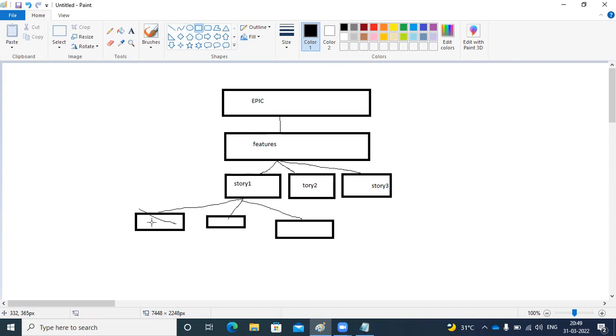So these tasks will be taken by developers or testers or whoever is responsible. If it is a design task, the design team will take that. If it is a development task, a coding thing, the developers will take that. If it is a testing part, the testers will take that. So depending upon the task, the developer will give the estimated time. He will say, I need 2 days for this. The tester needs 3 days for some tasks. Likewise, they will cover all the 2 weeks for everyone in the single sprint.